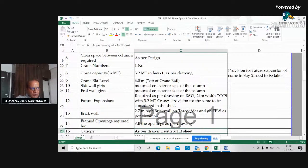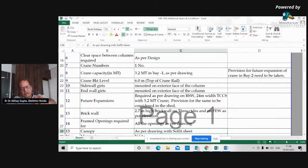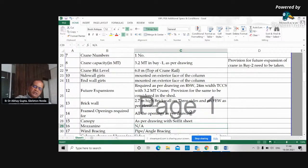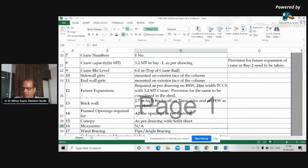Many PEB vendors have a good inquiry collection form that asks all the questions. This customized specification sheet should give sufficient information to the PEB vendor marketing team so they have no confusion. Canopy — whether a soffit is needed on the bottom should be made very clear. Mezzanine — if present, details should include column spacing and imposed loading. Specify only the live load on the mezzanine; the designer will calculate dead load based on section, deck sheet, and concrete thickness chosen.